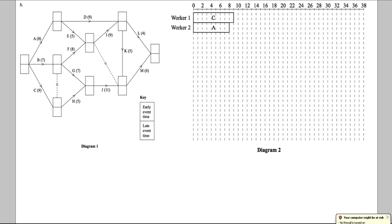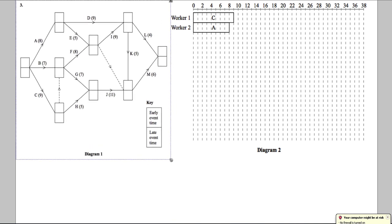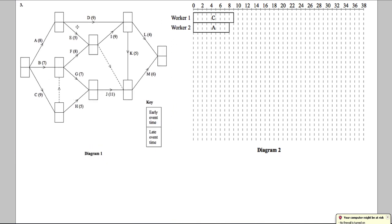We want to do a forward and a backward pass using this diagram. Going forward, we use the top box and find the biggest number along there. Going backwards, we use the bottom box and find the smallest number. We always start with the first node as zero.